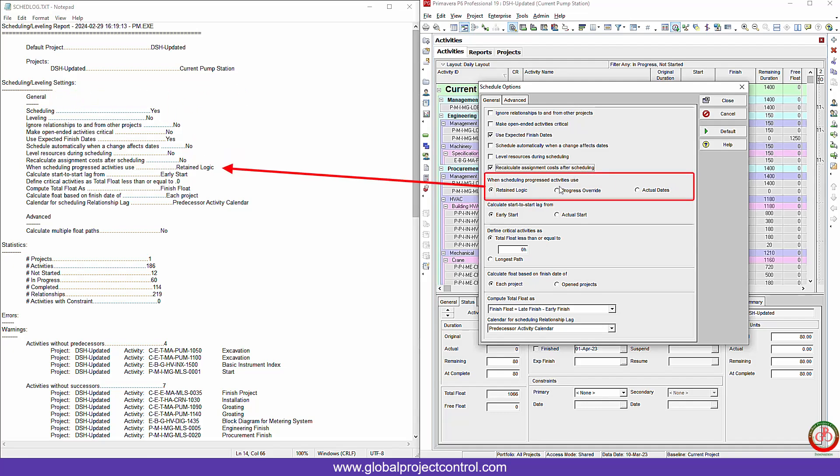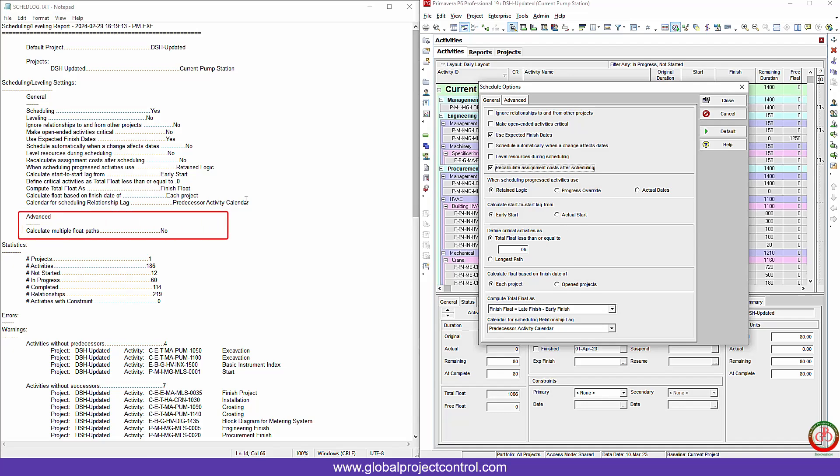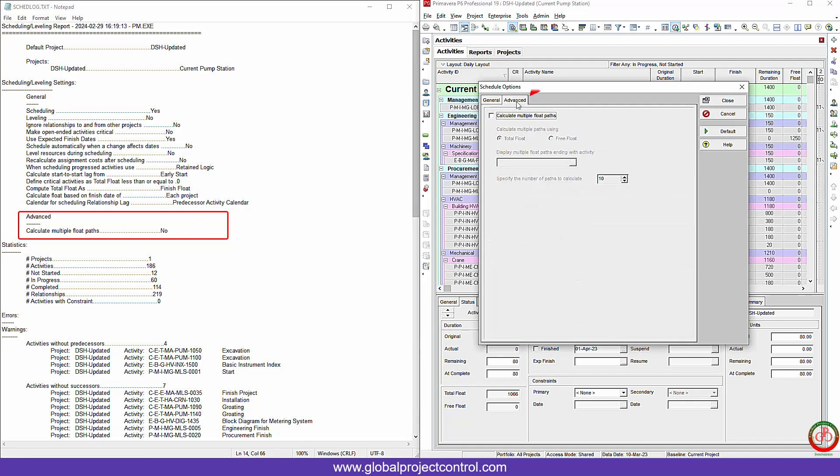The second part shows you the return logic progress override and actual date. You can see that over here. The next part tries to provide you the information about calculate the start to start lag from early start or actual start. You can see that on the left side according to the right side selection and so on. But what about the last one, calculate multiple float path? No. Where is that? It is here on the advanced tab. We have the calculate multiple float path and we select it as no because we didn't select it here.